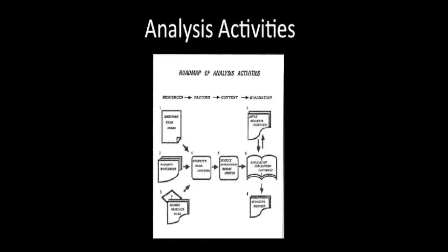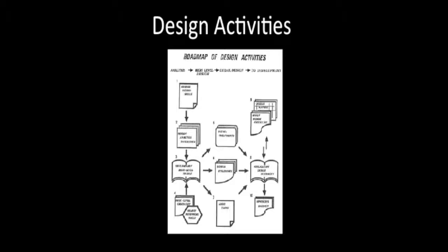The application description document has all the details of the project overview and must be approved by the project sponsor before the project can continue. The application description document is the deliverable in the analysis phase. The application description document is the input of the design phase.